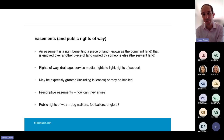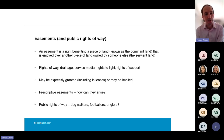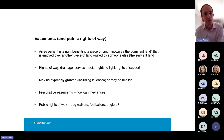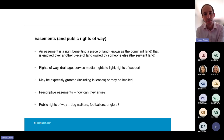You may also have granted easements yourself within leases that you've granted of your estate. Trusts routinely grant leases to occupiers, which will include rights of way, parking arrangements, and other easements like use of shared spaces. These need to be taken into account in looking at the development red line, and you may need to negotiate away some of those easements.